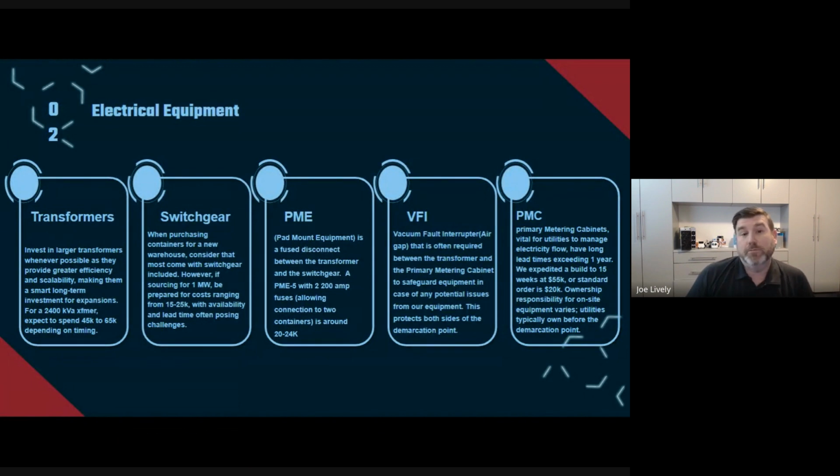They're spendy as well. Most of these pieces of equipment are anywhere from $20,000 to $50,000, depending on availability and the time that you go to physically purchase them. As I mentioned, everything in this industry is a commodity. The theme that's out there is you want to build in a bear market. One of the reasons for that is this exact concept here. All these things are essentially 30, 40, even 50% cheaper when no one wants to build Bitcoin mines.